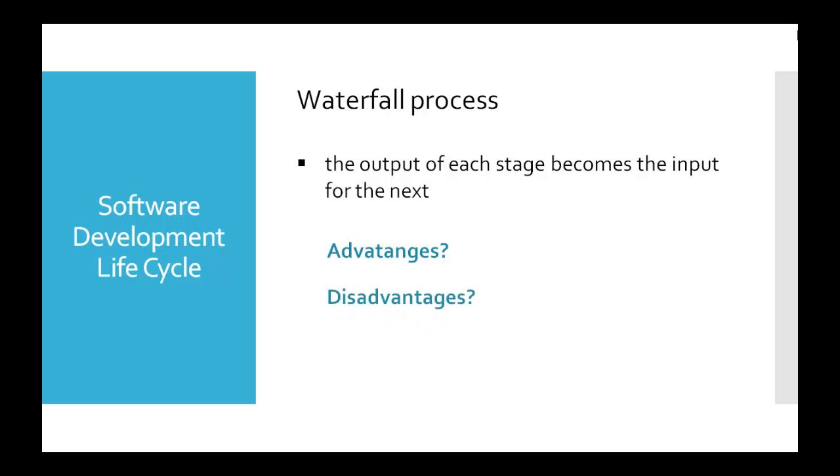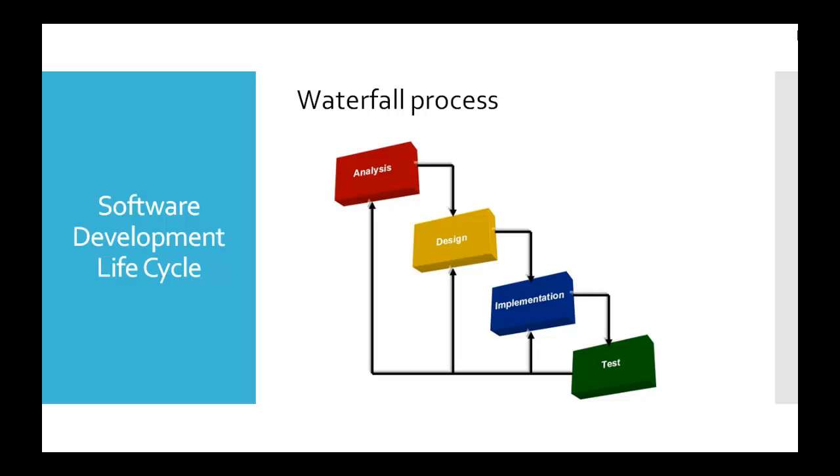The main disadvantage of a waterfall process lies in the fact that there is no going back to the previous process, which means that the process has no provision for correcting errors in early steps, for example in the phase of analyzing requirements. So the entire expensive engineering process may be executed to the end, resulting in unusable or unneeded software features. This is a diagram showing the waterfall model process.